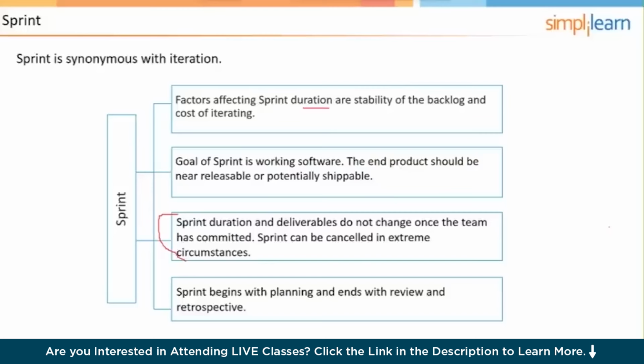And there was a question here: are there any issues with combining the retrospective and the planning ceremonies? And the answer to that is yes. Now, could they be combined depending on the environment? The answer is yes. And the way we would arrive at whether or not it would make sense is who's going to be participating. But they would be separate agendas. So the agenda for the retrospective is what went well, what did not go well, what are we going to do different? And the mandatory participants for that meeting are the team, the Scrum team.